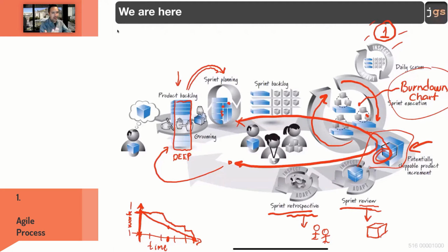Okay, I am going to give you this hint and more or less summarize what you tell me. When we talk about a review, let's do a review of our sprint. Usually, the point of view, the core for the review is what happened with the product. What happened with the product is, let's talk about, did we finish everything that we committed to finish? Is the product moving forward in a correct way? Maybe we didn't finish a particular functionality. What happened? Why? Is something that we are missing as a team? Is something happening with the customer, with the project?